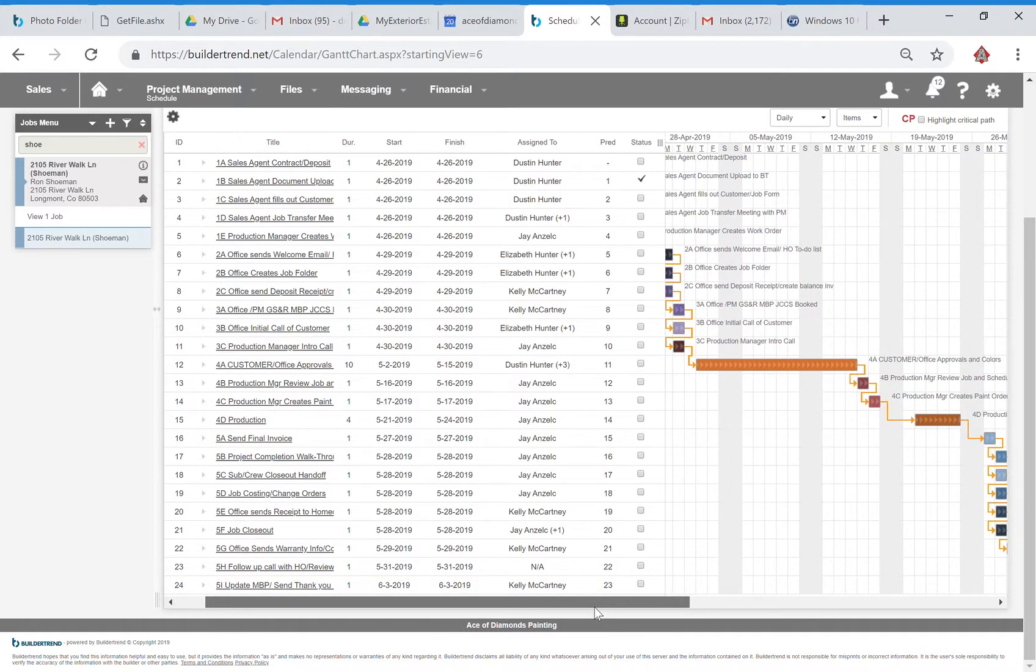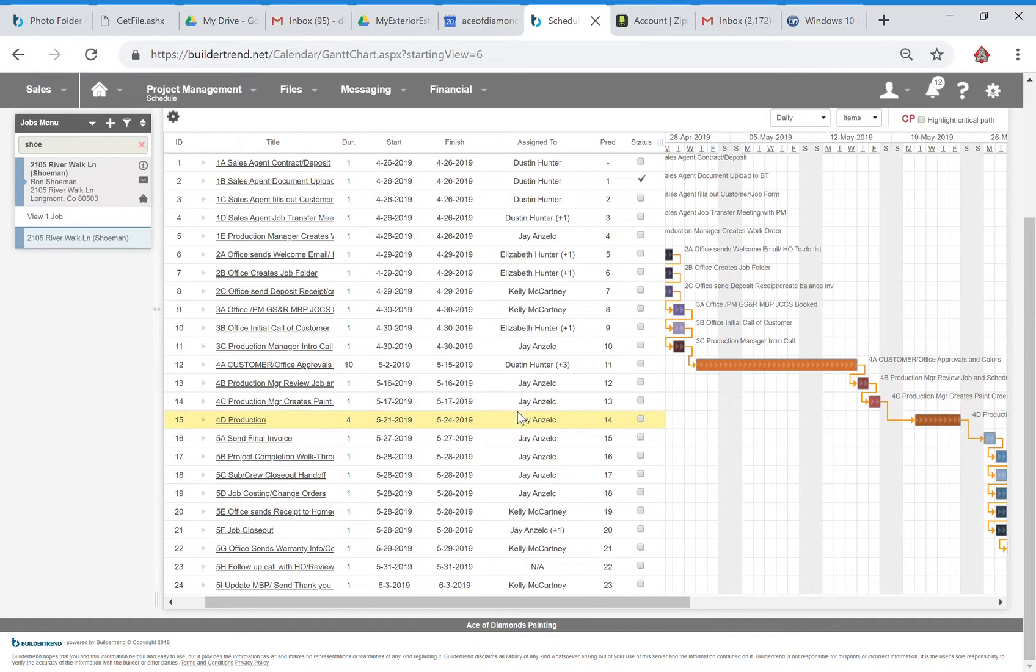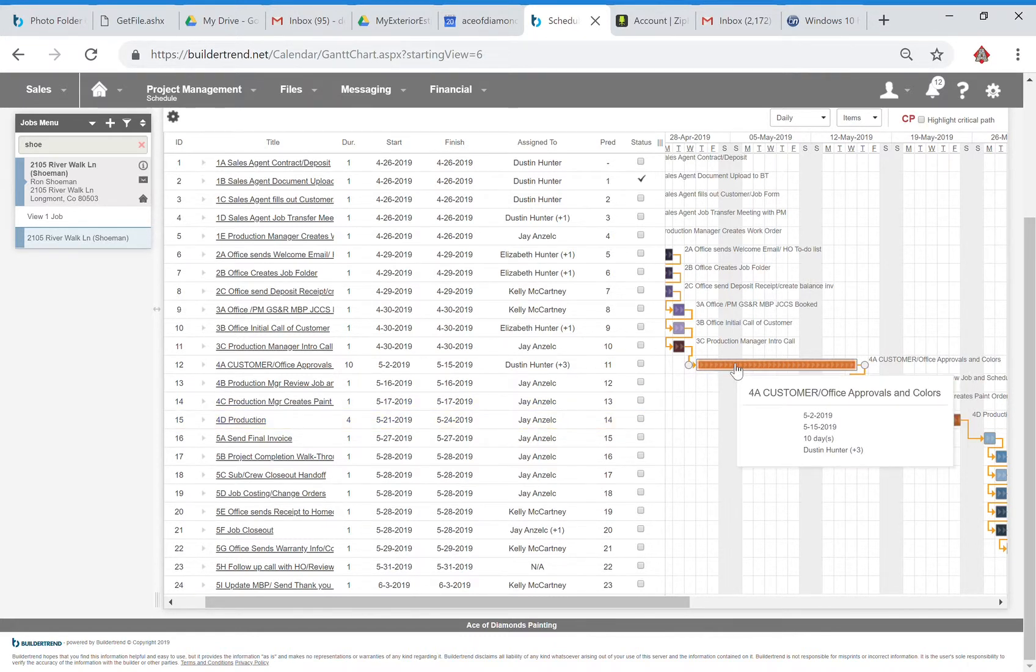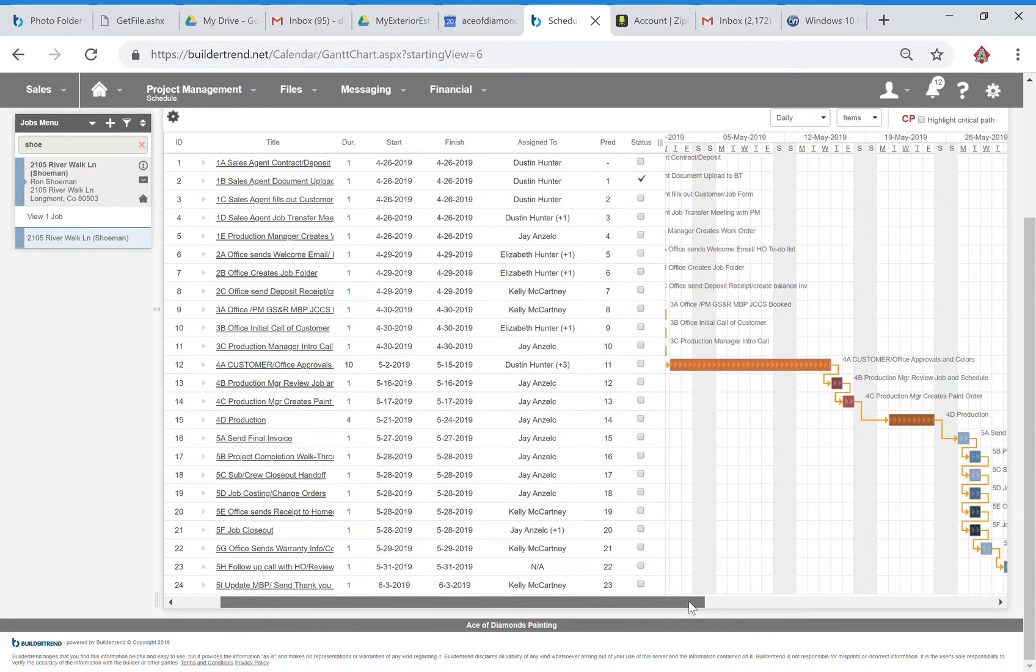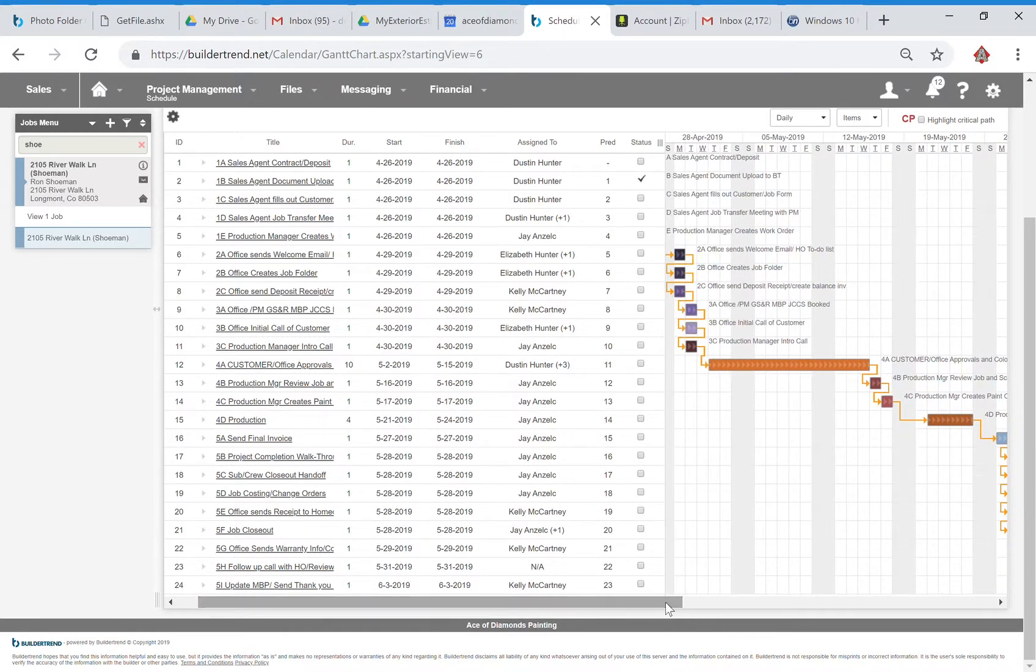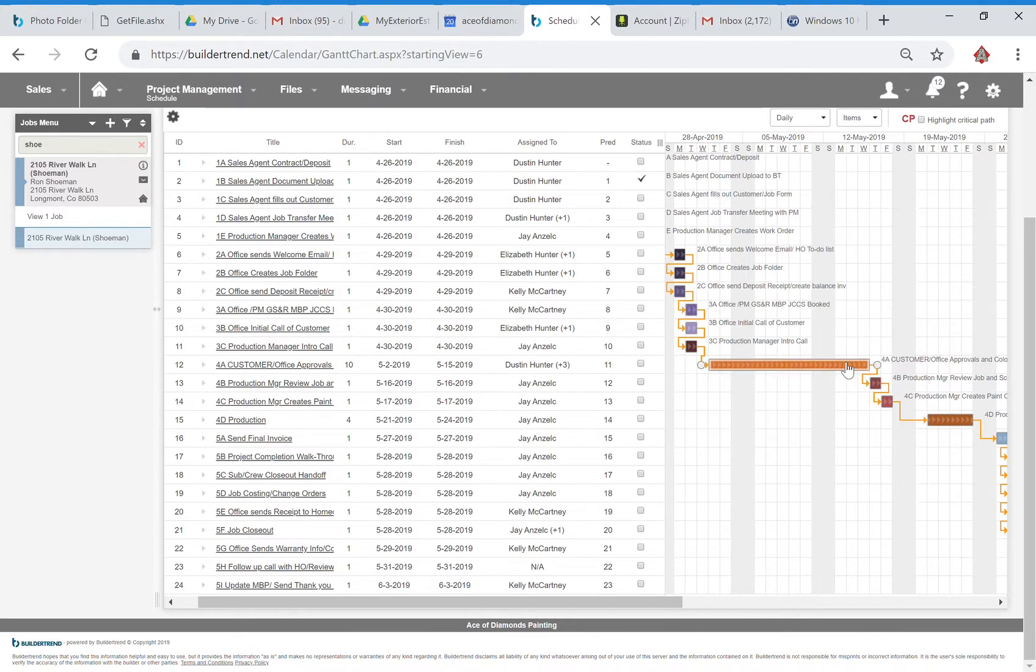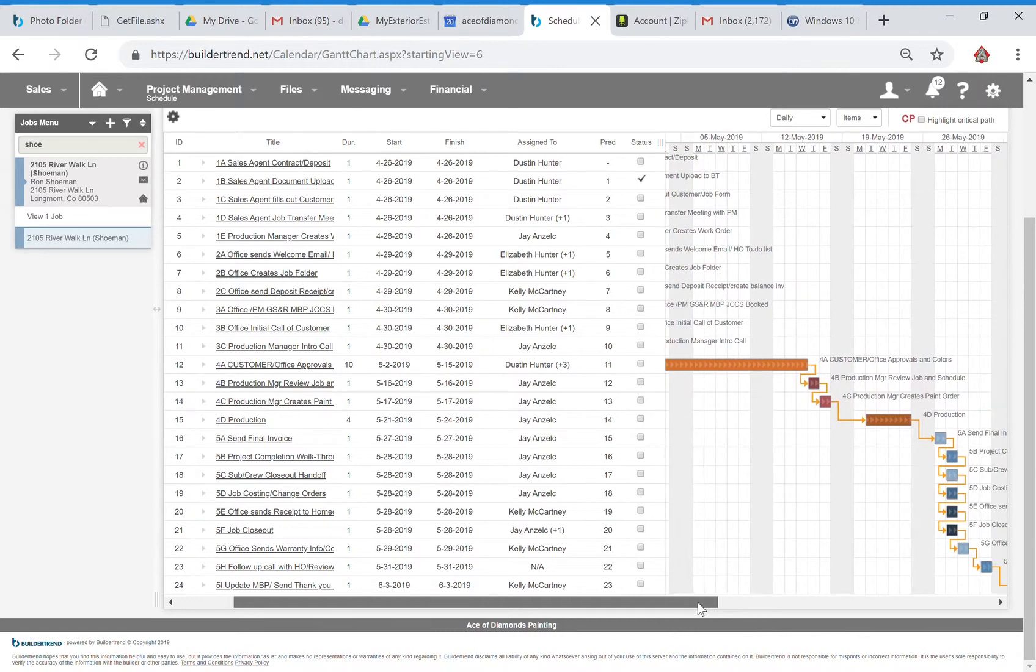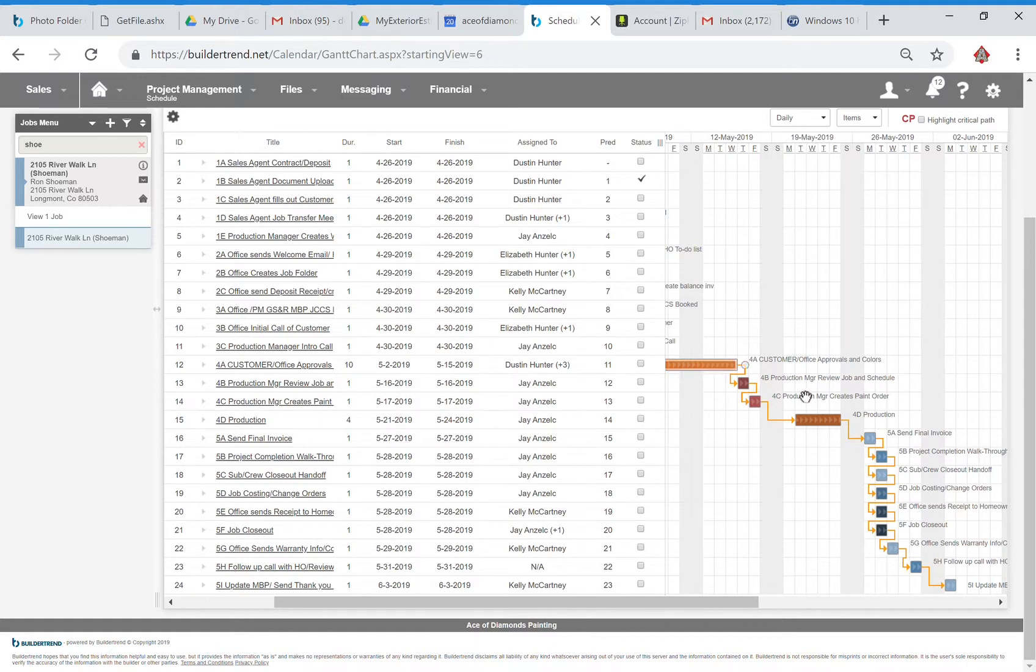And we've got this long phase of customer office approvals and colors. So this is a to-do that actually gets assigned to our customer involving the colors and what they need to do to get ready for this job to be able to start. We have that as kind of a long time period there and the reason being is that we want this to just kind of be the lag time between when the job is booked and when it actually starts. Right now we've got Ron's project starting in this week of May.